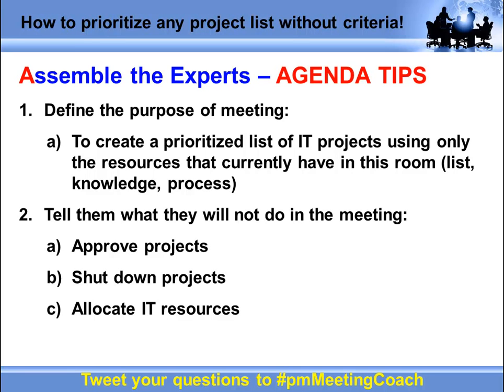And I even go a step further and I tell teams I work with not to do any estimates on the projects until after they understand the priorities. And I do that because if we have a list of 200 projects, I don't want my technical architects to spend hours and hours sifting through 200 projects trying to figure out what some of the technical requirements and the architectural fit might be if we're not even going to work on some of those projects, right?